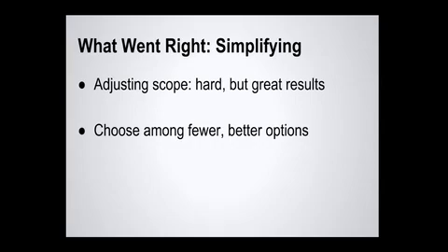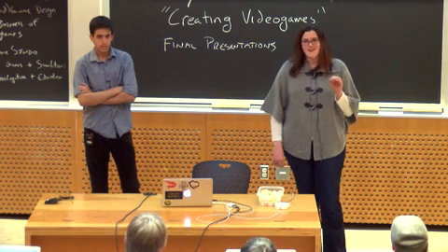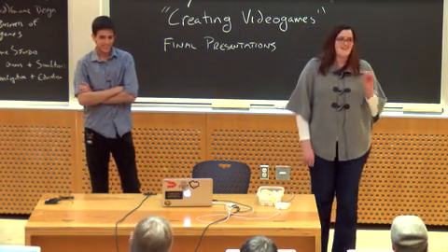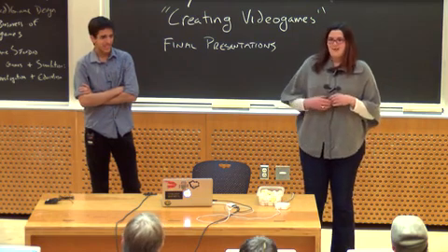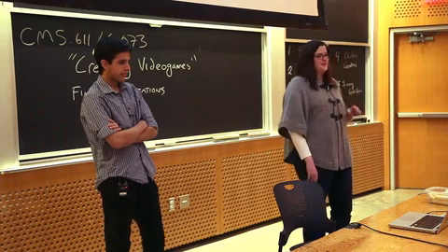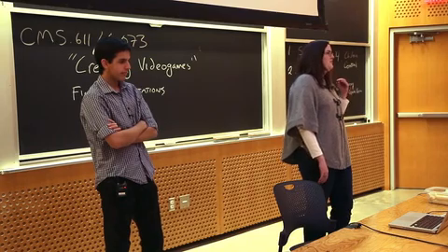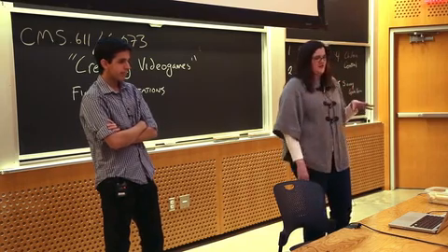It was really hard to adjust scope. It was easier in the other games because you realize you only have 2 weeks. When you have 8 weeks, you think you can do a lot, and you really can't. You think you have a lot of time, but classes and applying to jobs and everything takes all of your time. And so you have to learn, okay, I only have so much time for this class. I can only do so much on this game, so I'm going to adjust the scope.